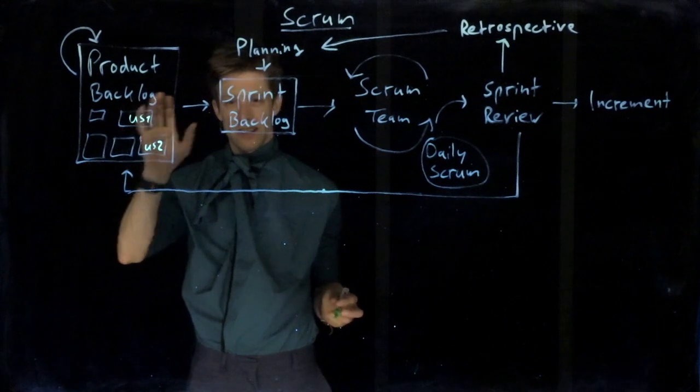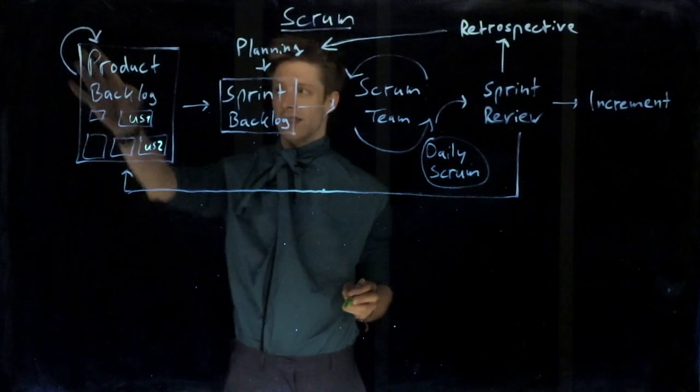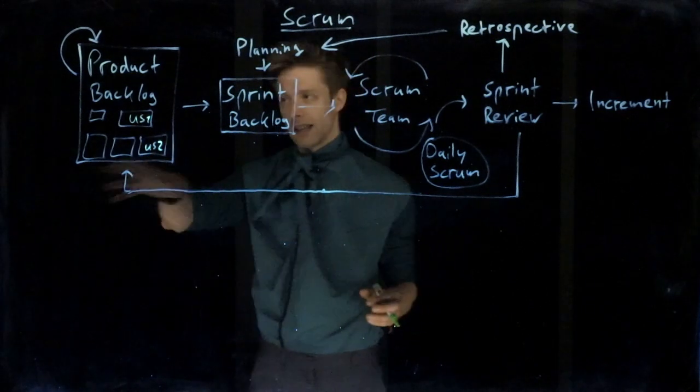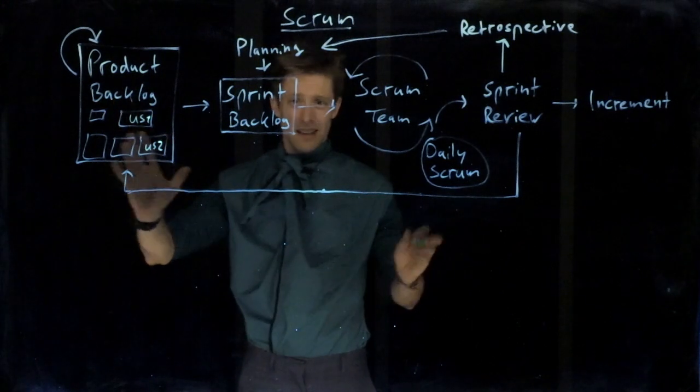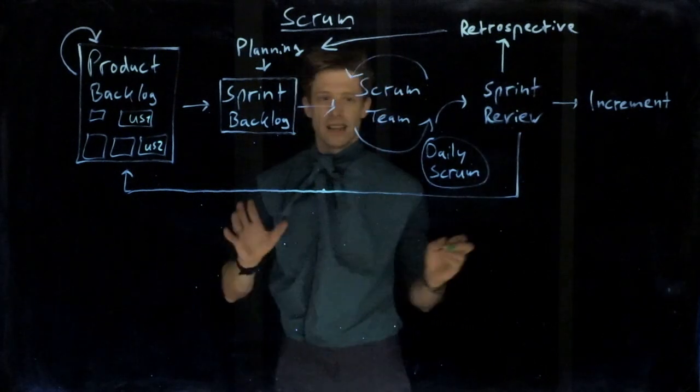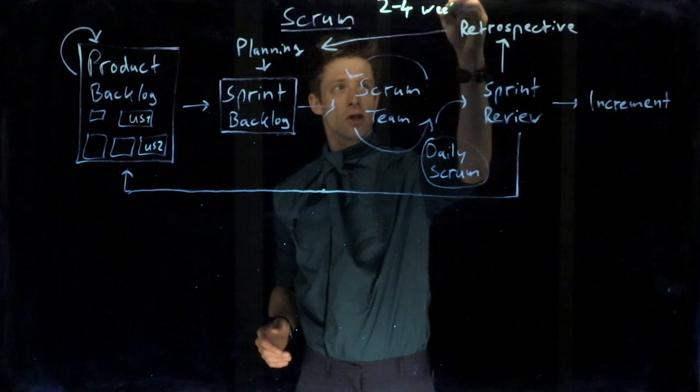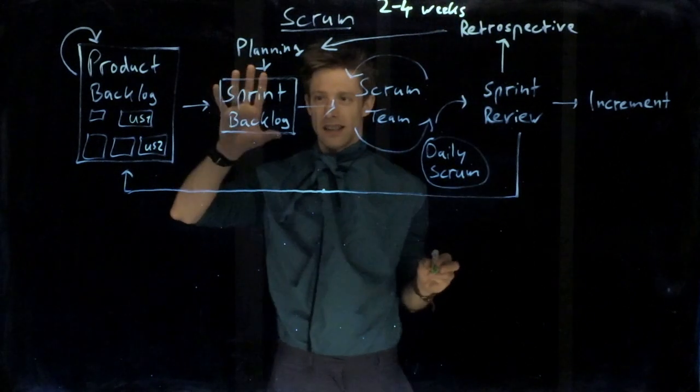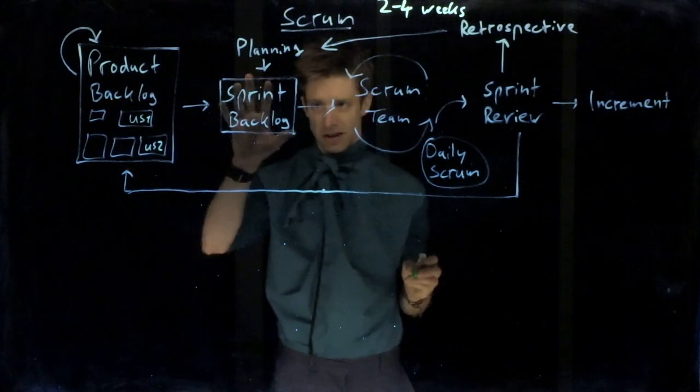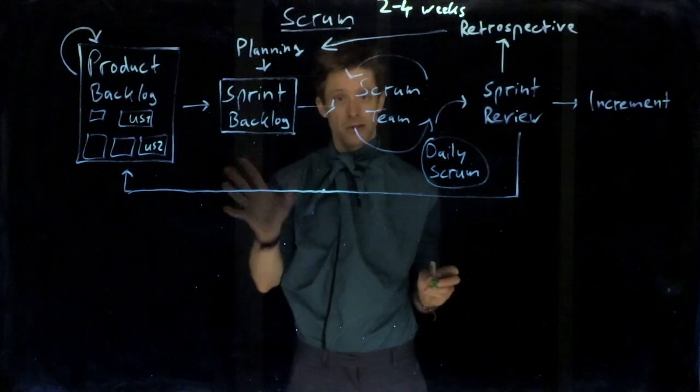This Product Backlog gets populated in the beginning, so you just try to get all sorts of things in there. Of course, it's flexible. That's indicated by the arrows here. It can change over time, and since we are in an agile development, we expect change, so we expect this Product Backlog to change. What happens then is that we have increments that, in our case, are called sprints. Each sprint is about two to four weeks in Scrum. In the beginning of the sprint, we take items from the Product Backlog into our Sprint Backlog.